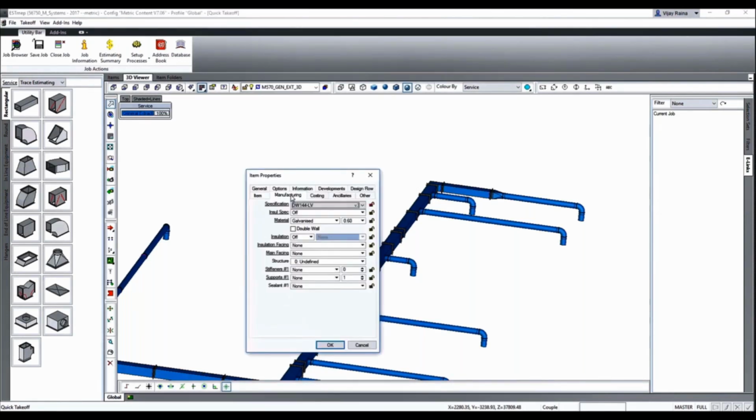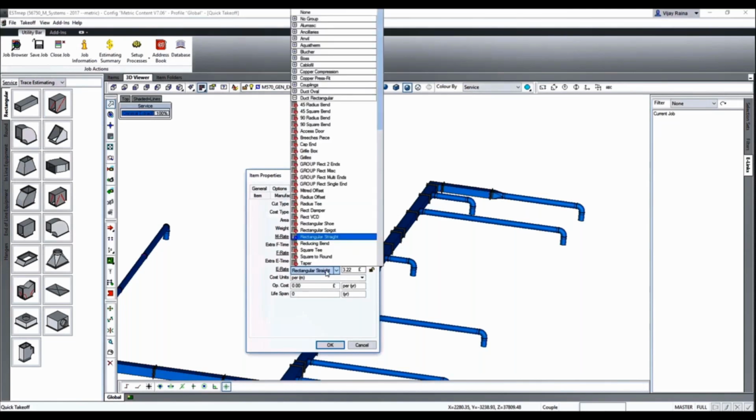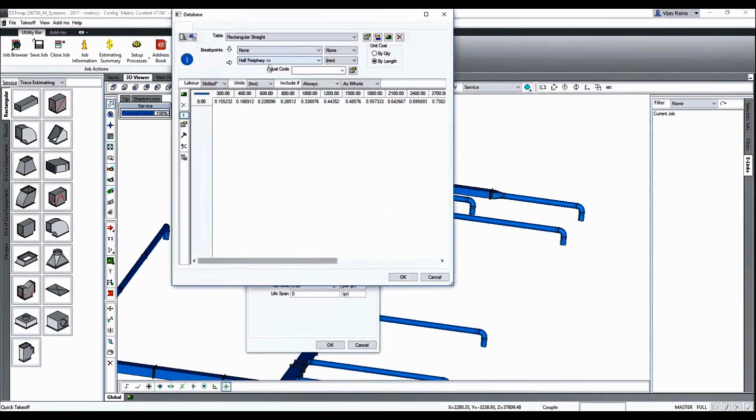So if I go to the costing analysis, I can come up with the area, what material, what is the weight, and what is the rate of it. Okay. So there are different euro signs here. The currency is different, but you can change it to our currency value also. You can update it. The cost unit you can come up with. So if I go to the database also, I can do some further changes in the database. So what is the E-rate database? I can go to the database and I can do some default changes also here.